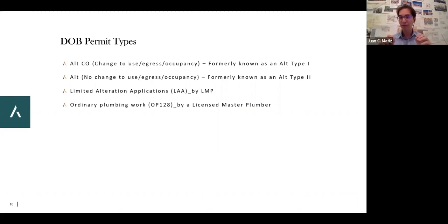And what do I mean by that? That one wall that has to move, which requires a permit, you have to go and request an inspection for asbestos and hazardous materials. That testing will cost you some money. It will identify, especially if you have a building that was built in the era of the 50s and 60s or in that general area, highly likely that something may have asbestos, the glue underneath your kitchen floor or something, the glue or the tiles in your closets, right? It could also be very simple things, but then you have to abate that.